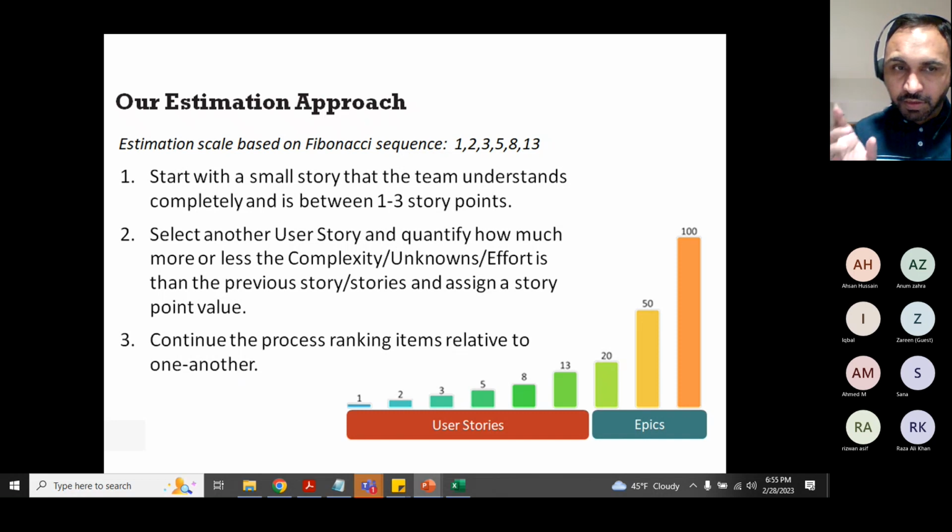Because the sprint was only 10 days, two weeks duration. And story, you are not the only one, don't be selfish. If you're a developer, don't consider that it has only a development piece. Remember that it has a testing piece as well, remember the tasks bullet point that I was showing you guys. When you provide the estimate, you don't provide it only considering your work. Oh, from the development side, I think it's only two story points. It's easy development. Okay, it could be easy development, but testing could be complex.